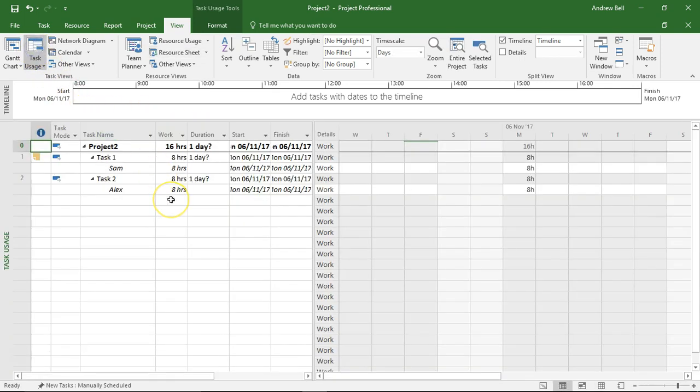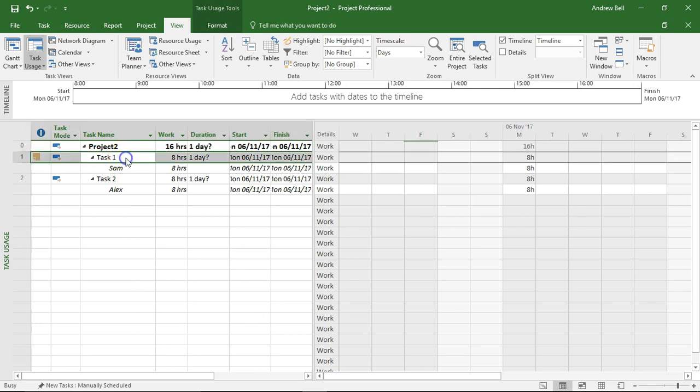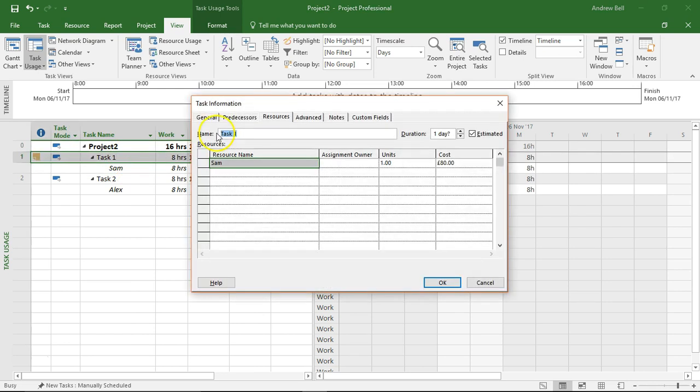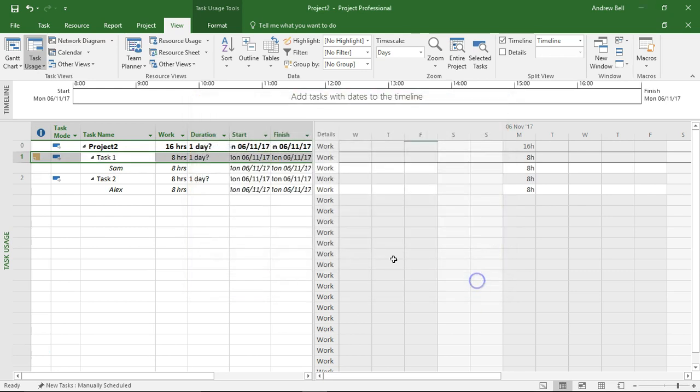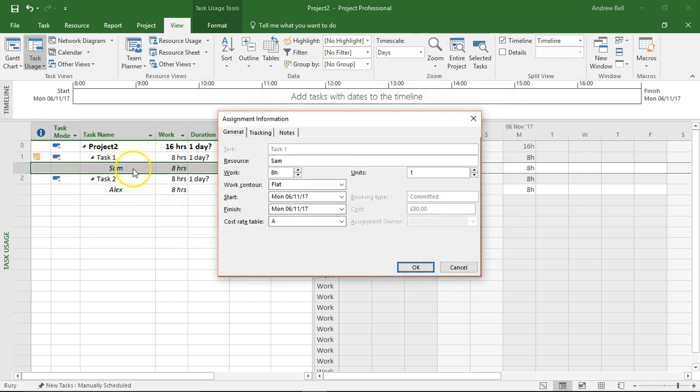The task usage view is a list of tasks and the resources that do them. Now if I double click on task 1 here I'm going to get the task information. But if I double click on there I'm going to get assignment information because this is how Sam is working on task 1.